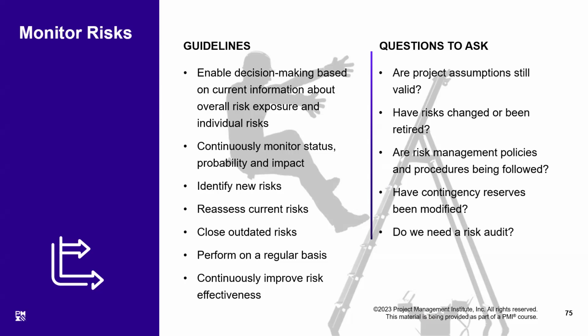Lastly, do we need a risk audit? Although it is not a necessity, because we assume that for risk management purposes, the risk manager and his team are sufficient to handle the working of the risks. But in case you are dealing with a very complex project, maybe an external team might visit you to do your risk audit, whether you are following the correct processes for risk management or not.